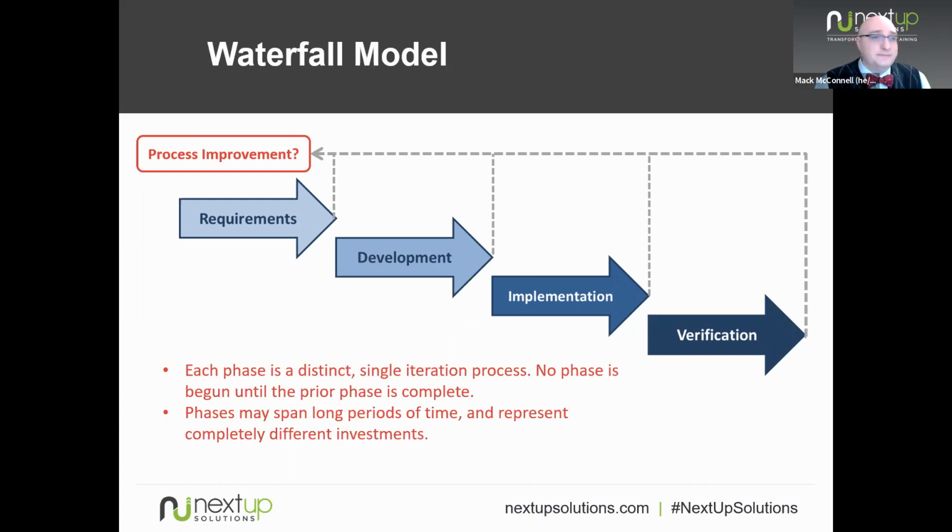Lessons don't really apply. So the problem we have with that is that it's great to capture feedback in the interest of improving in the future, but if you only do it at the end, it's not very useful. Even if we do it in between the steps of a waterfall model, well, so what? Those were lessons learned about requirements, and now we've moved on to development or whatever the next stage in our flow is. If we maybe go revisit them a year later when we're on to the next requirements, that's the most we could hope for in terms of utility.